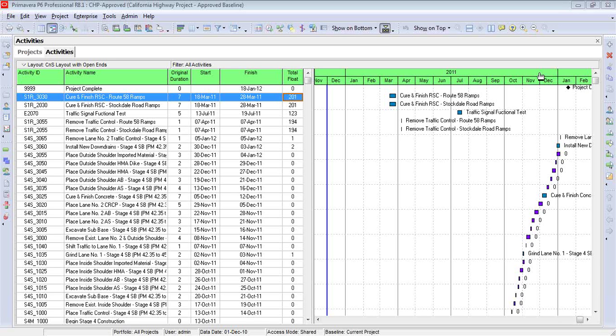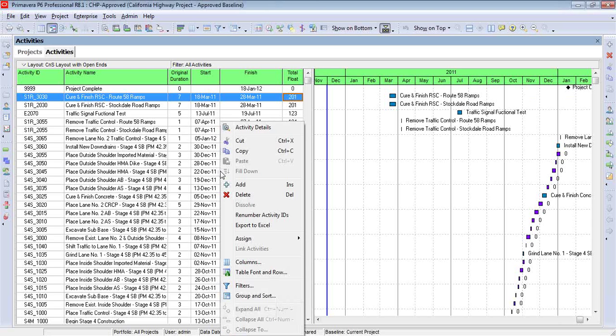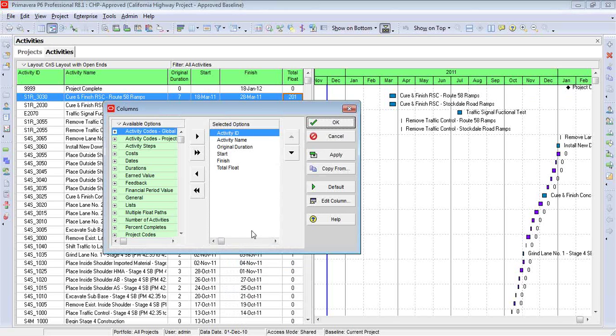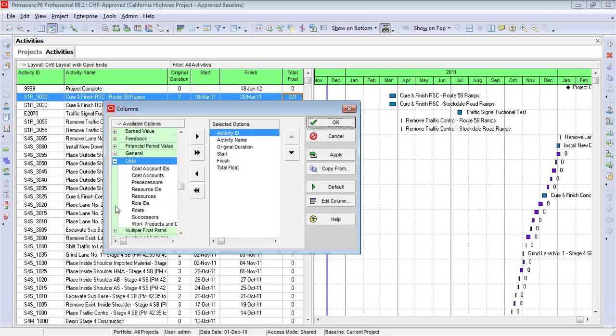There's a couple of ways to check them in P6 that I find very convenient. The first method I'll use while I'm building the schedule, which is more or less real-time checking of open ends. If you've used Microsoft Project, then you're probably familiar with this method. We're going to add columns to represent predecessors and successors. To do that, I'm going to right-click within the activity table, go to columns. I'm looking for the data that contains predecessors and successors, because I don't always remember which category it is, although to make it easy for you, it's under lists.